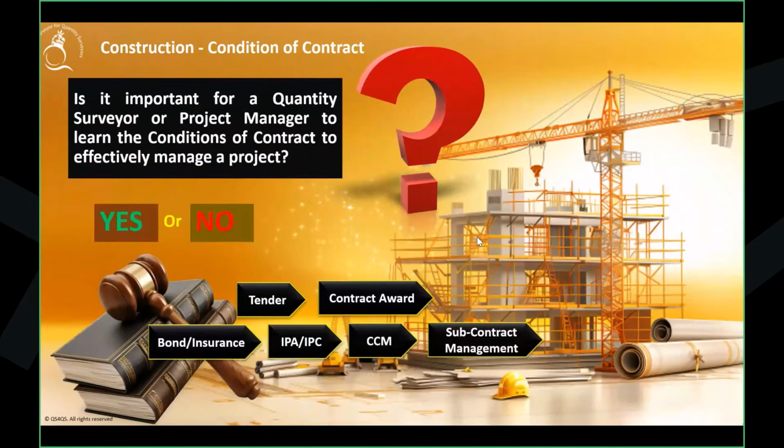You are going to have subcontractor agreements, either nominated or domestic. You should know what terms and conditions you have to enter into with them. For the taking over certificate, either as consultant or contractor, you should know how to certify or issue it. If you are a contractor, you should know the requirements to apply for a taking over certificate. Once it is issued, you should know the statement at completion. What are the requirements? How do you do the submission?